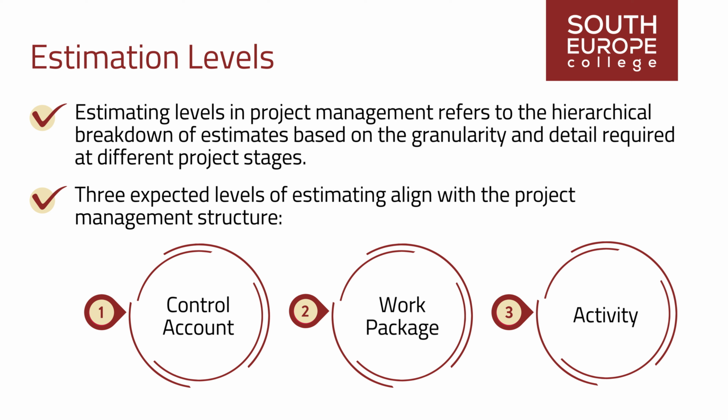Activities are used for detailed scheduling, resource assignment, and day-to-day project execution. They form the basis for project tracking, progress measurement, and resource management. Activity estimates are the most detailed and specific. They involve breaking down work packages into individual activities and estimating the time, resources, and costs associated with each activity.